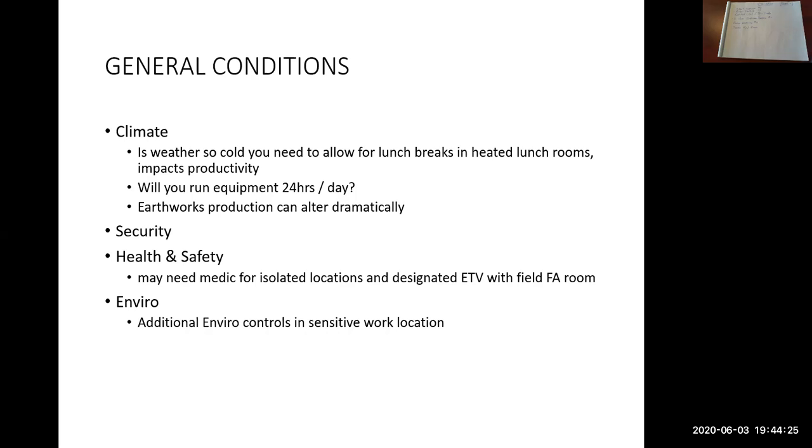I went to the job site and was looking at the earthworks job that we were building. At the end of the shift at 5 o'clock, everybody got out of their machines but left them running. We had, I believe, 2 dozers, 4 articulated rock trucks, and 3 scrapers. All the machines were left running overnight because it got so cold that the equipment would not start in the morning.